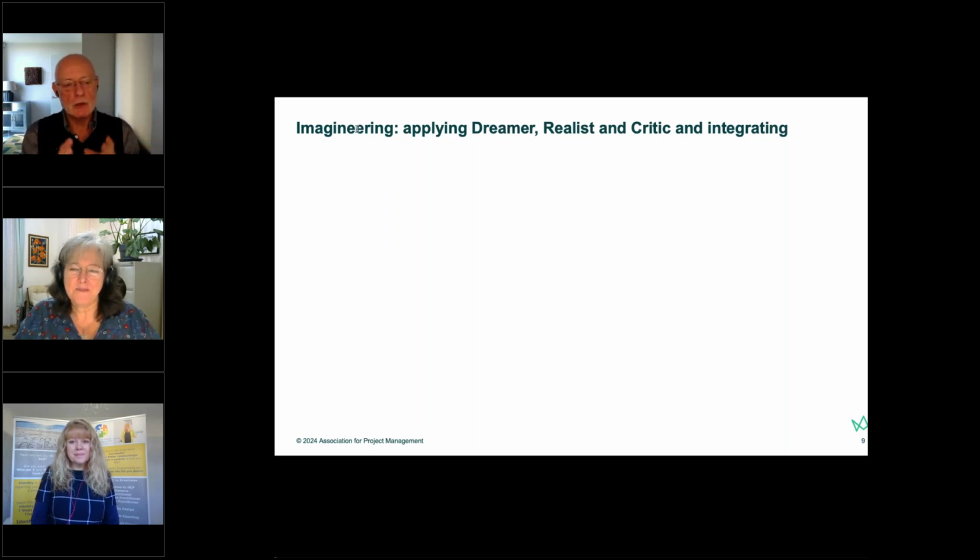Okay, and there might be other things we could think. I'm being a dreamer here because I'm looking up. How could we reduce scope somewhere else, if that's even possible, without affecting the requirements, because they're not always the same thing? And another thought might be, could we deliver the project in phases so that we've got different timings? So this new requirement is perhaps delivered later. That might be another thing to do. Emma, do you have any wisdoms there?